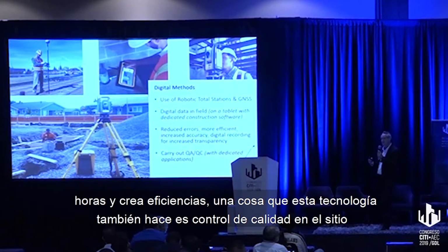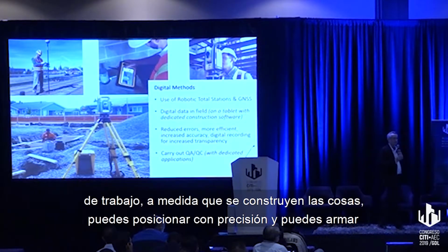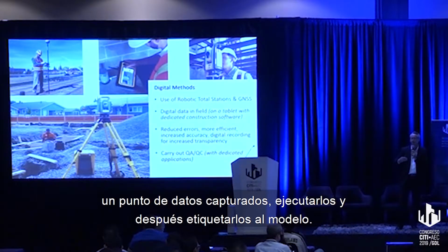One thing this technology can also do is quality control on the job site. So as things are constructed, you get precise positioning and you get data from that, that data point being captured, executed, and labeled on the model as well.